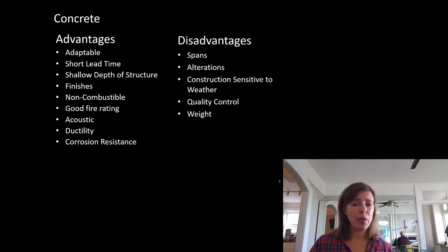Contractors have to build that risk into their price. And even then, sometimes they might be screwed over because they can't predict the weather. And it's not fair for them to bear that risk on their own. The owner has to bear some of that risk as well. But they are the experts. They understand better what the implications of that are. So there is a bit more onus on the contractor, but they can't be responsible to bear that all by themselves. The weather is the weather.